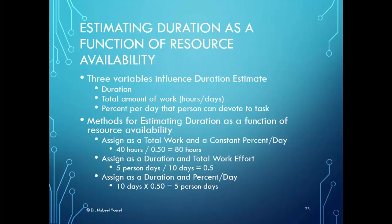There are three variables that influence duration estimates: the duration itself, the total amount of work hours or days, and the percent per day that a person can devote to the task. Methods for estimating duration as a function of resource availability include: assigning total work and a constant percent per day — for example, 40 hours divided by 0.5 gives 80 hours; assigning duration and total work effort — for example, five people working 10 days gives 50 percent effort per person per day; or assigning duration and percent per day — 10 days times a percentage tells you how many people are needed.